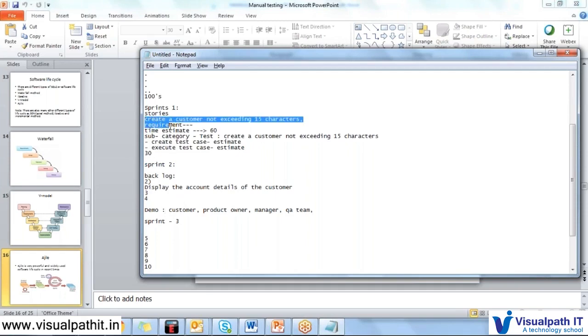So what has been completed in sprint 1 and sprint 2, they demo to the customer as well as the product owner. If the customer has some changes, or is not satisfied with some of the development or some parts of the application, immediately he can inform the product owner, and the product owner will create one more story, which will be maintenance of this, or however they want, or as a new story. It depends on the severity of the change, and they will start doing that again.